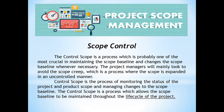Scope control, or control scope, is probably one of the most crucial processes in maintaining the scope baseline and changing the scope whenever necessary. The project manager mainly looks to avoid scope creep, which is a process where the scope is expanded in an uncontrolled manner. Control scope is the process of monitoring the status of the project and the project scope and managing changes to the scope baseline, allowing the scope baseline to be maintained throughout the life cycle of the project.